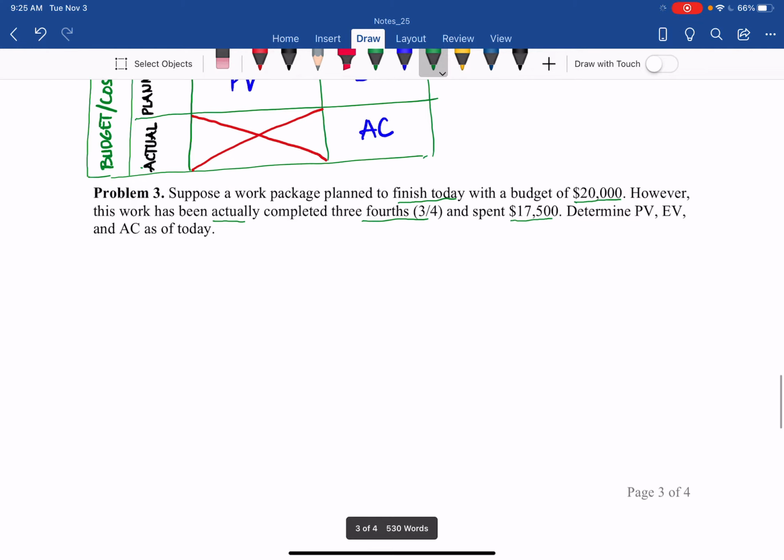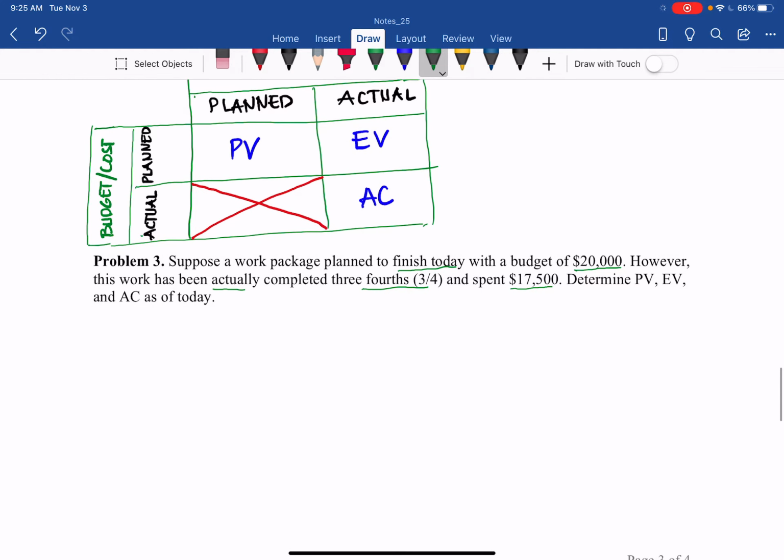Let's apply that in problem 3 for this video. Suppose a work package planned to finish today, 100% today, with a budget of 20,000. However, this work has actually been completed 3/4, so that is the actual work completed, and spent 17,500.